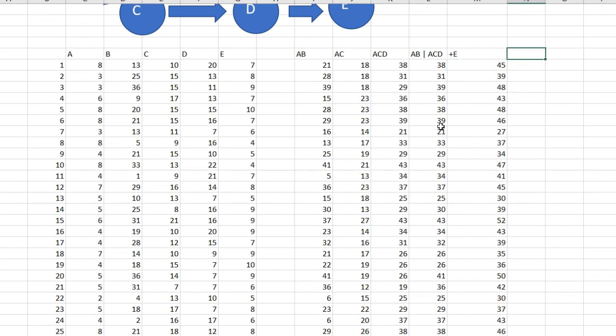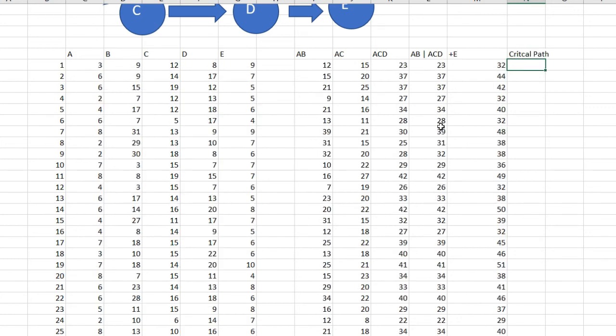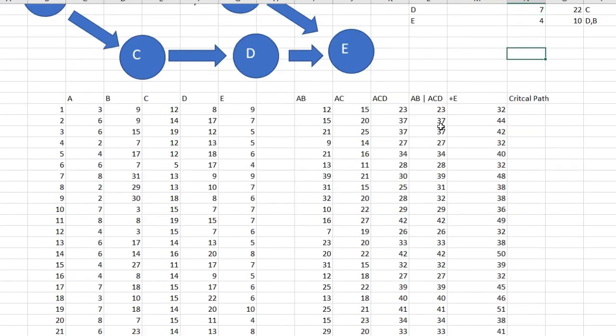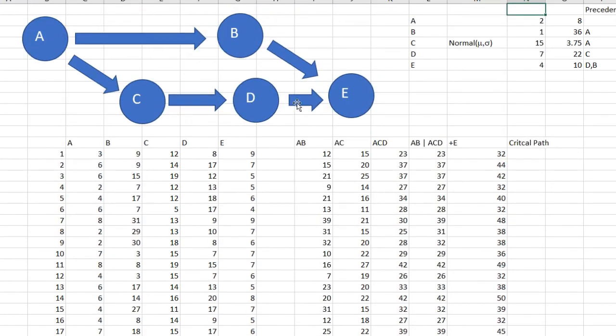Now if you know a little bit about project management, I need the critical path, which is the critical path. Now in this simple example, the critical path can be either ABE or ACDE.